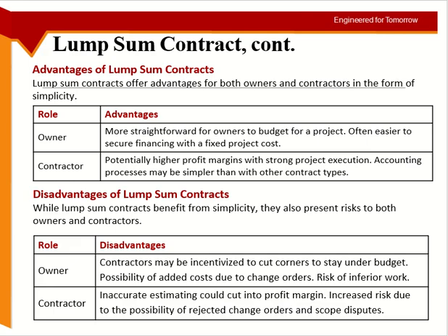And there is a possibility of additional cost because of change orders. In case of change orders, the contractor may ask for a higher price because he already quoted a higher price. He already quoted maybe 20% extra for the 2 floors, so if you are going for a 3rd floor, he will increase the cost accordingly, in the same ratio, right? So this can go against the client or the owner.